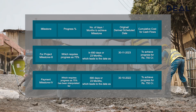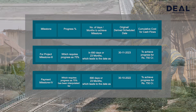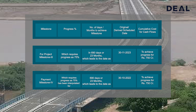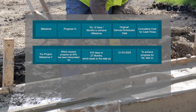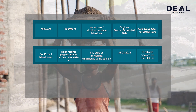Payment Milestone 4 requires the same 75% physical progress as Project Milestone 3 and correspondingly leads to 30th November 2023 to achieve progress worth Rs. 750 crore. Payment Milestone 5 requires 90% physical progress and has been interpolated for 810 days or 27 months, leading to approximately March 2024 to achieve progress worth Rs. 900 crore.